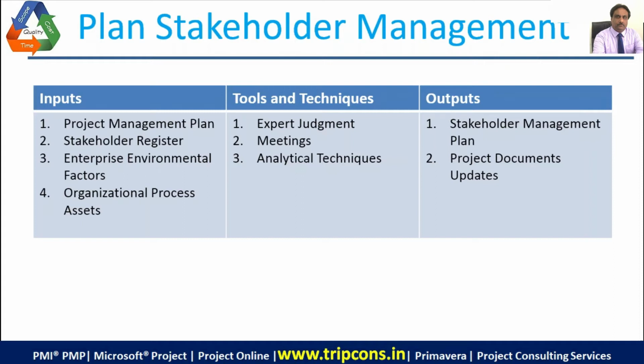Analytical techniques would be like identifying who have the potential to influence and impact the projects in a big way, who are in the leadership role, the most powerful role, and then you would be updating your stakeholder columns in the stakeholder register. So you would get a stakeholder management plan and project document updates.